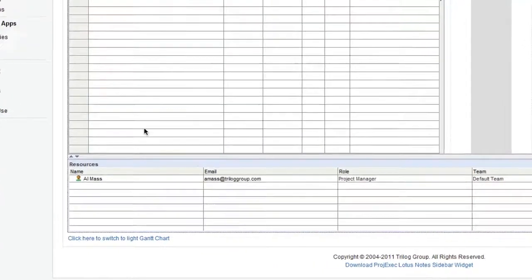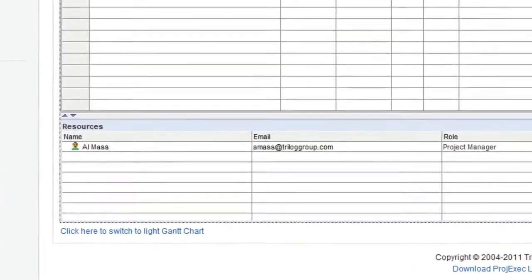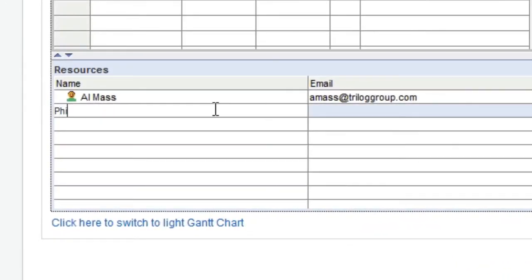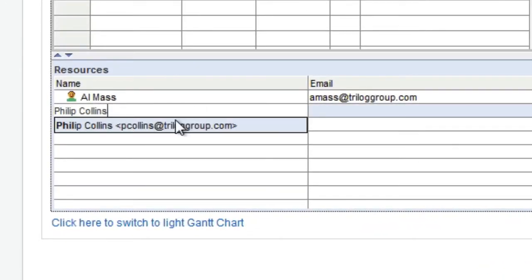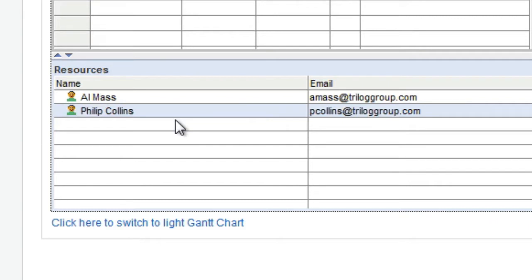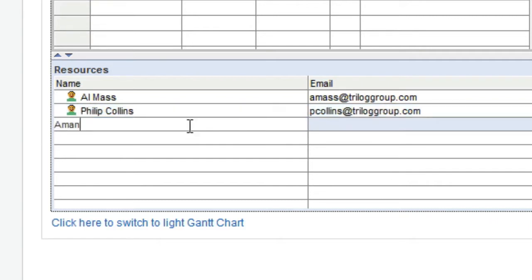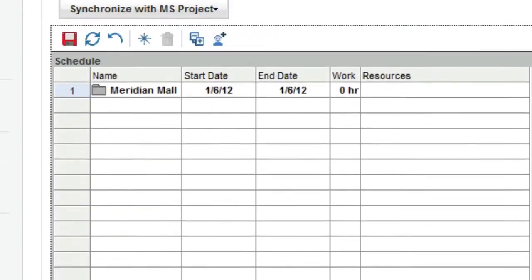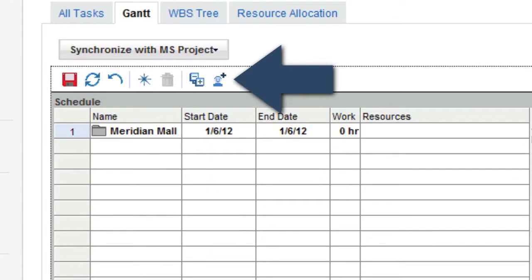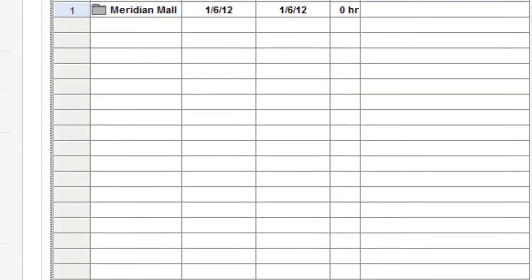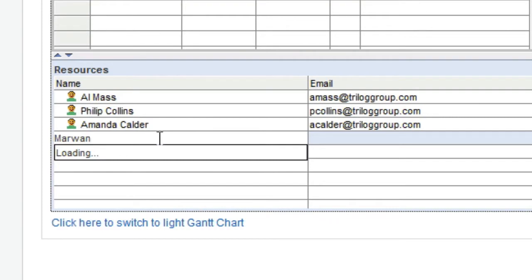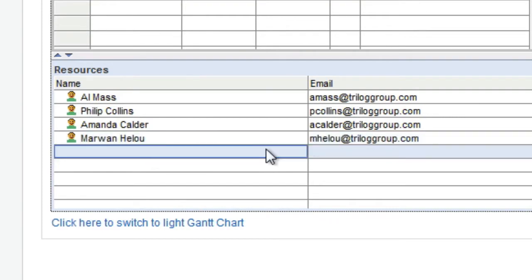We will start our project plan by adding a few team members to the project. When you start typing a person's name, Project Exec Live looks up people in your IBM Smart Cloud organization. You can also use the Add Resource button on the Gantt Chart toolbar. Either way, you can select a person, add them to the team, and assign them to tasks later.